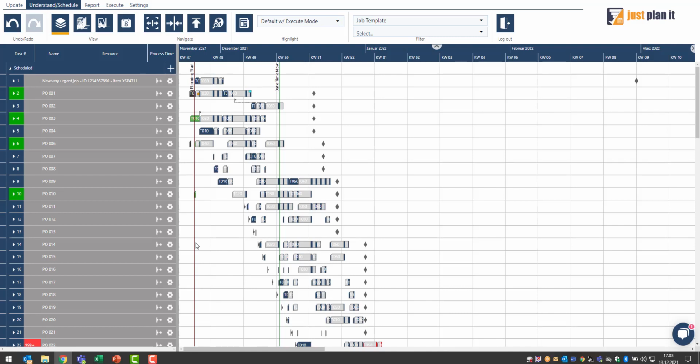We have been looking at baselines. Now we have got functionality to remind you of setting the baseline. Now, as you set the baseline, it would be cool also that you could better make use of it. So the standard way of using the baseline was formerly just totally focused on exporting data and then making deviation analysis from there.